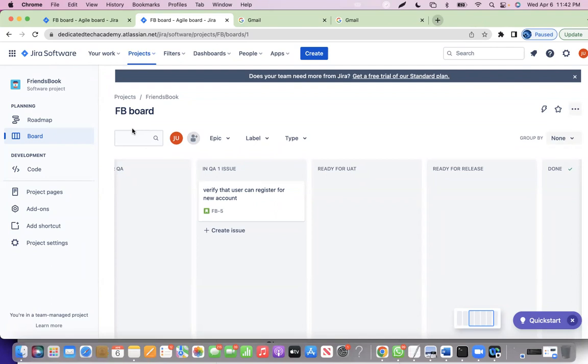So then it goes to Fatima next, and Fatima unmutes and does the same thing until everybody's done in a team. Now, the best practice here is that 15 minutes and it should be over, right? But some teams purposely take beyond 15 minutes, like an hour sometimes, because that is the only meeting they have, and they want to make sure everybody is clear, everybody gets what they need and moves things forward. But if a company has so many meetings for everything, then they may have only 15 minutes of stand-up, right? So, pros and cons. Just keep that in mind.